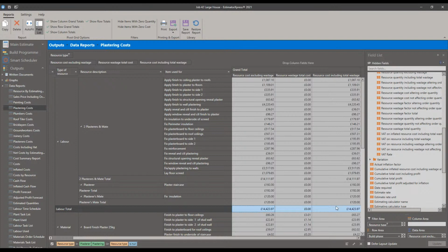Before I issue the quote to the customer, roll it back a bit, go into your materials price book, or say your labor price book, and adjust the labor prices in there to be in line with what you're commonly quoted, because the labor prices are something for you to manage. So that's the kind of indication. Then you can see if you're going to need to update those as well. So you can come into these sections and have a quick glance and gander at the prices involved.